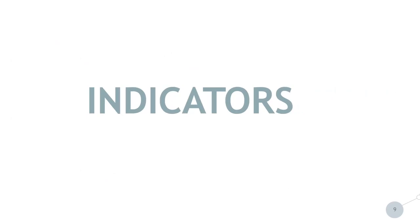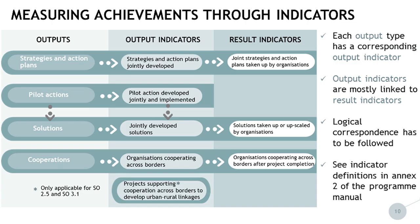Coming now to the indicators, with the main question of how to actually measure the achievements of a project — this is done through a set of indicators. As we were seeing in the previous slides, we have four different output types. For each output type, there is a corresponding output indicator. For example, strategies and action plans have the related output indicator that needs to be selected: strategies and action plans jointly developed. In the same logic, there is also a related result indicator, as shown in this visualization.